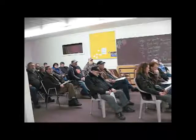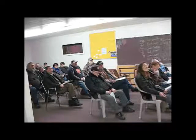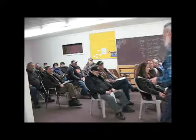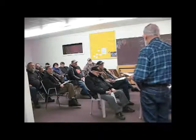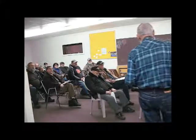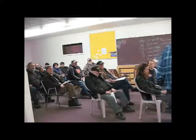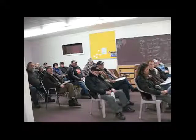So what's the difference between that and capital improvement projects, and how do we perform those? Capital improvement is any upgrades that are beyond the scope of the maintenance contract. So if I've got roads over the Kenny subdivision that are substandard, we would like to fix them, the drainage system doesn't work. This is going to be a fairly expensive project, and it's not routine maintenance, it's reconstruction of a substandard road. That will go forward as a capital improvement project.